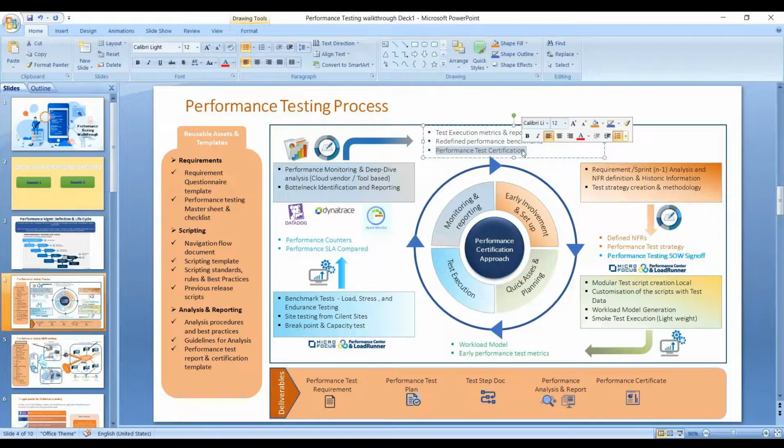It usually happens that we give the certification for this build. As a practice, when we are certifying the application, we take an image of it: whatever the configuration is, whatever the build is, on a software level I'm talking about, whatever the user load was, and from which site we tested. Every minuscule detail of the environment we tested, we are certifying that.